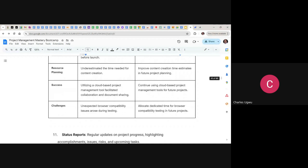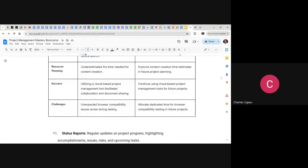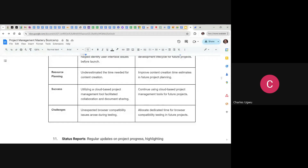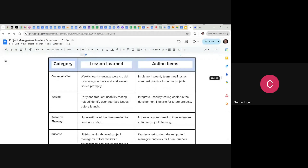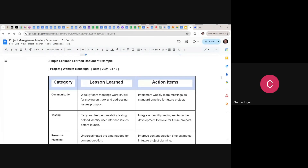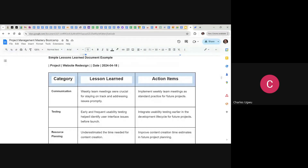Under challenges: unexpected browser compatibility issues arose during testing. The action is to allocate dedicated time to browser compatibility testing in future projects. This is the lessons learned document — it is completed when the project is closing. We document all the lessons learned throughout the project and archive it for future reference.